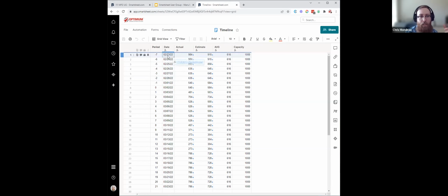So I have a list of days, and then a cross sheet formula, which is a SUMIFS of that effort. If it's hours for that batch, it's summing the hours of those batches where the start date of that production is less than or equal to this date, and the finish date is greater than or equal to it. We can provide these formulas or some samples afterwards so you can see this. Basically, all it's doing from the production schedule is saying how many batches are in production where this date is between the start and finish date of that batch, and it's summing those hours together.